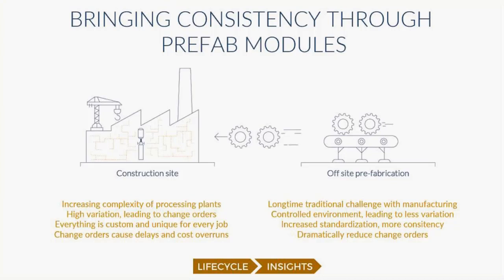From there you hook it up, you run everything you need to run between everything, electrical, piping, interconnect, whatnot, and this reduces the variability that you see at the construction site or the overall project, right? Because you're removing variability, you're improving repeatability, and you have fewer change orders overall.